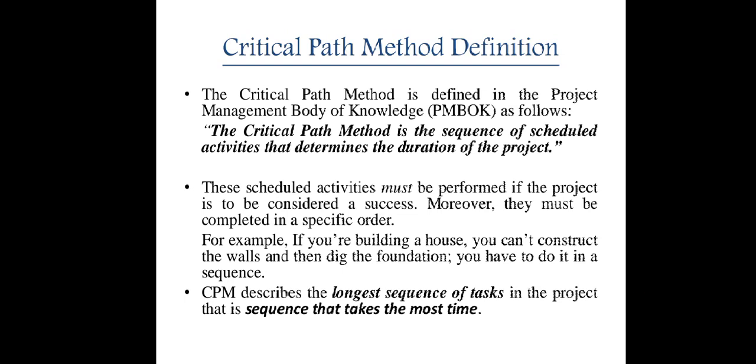See, the activities must be performed in a specific order. For example, if you are building a house, you cannot construct the walls and then dig the foundation. Obviously, first the foundation has to be dug, and on that the walls have to be constructed. So activities must be performed in a specific order. So that is the meaning of that. And CPM describes the longest sequence of tasks in the project, that is the sequence that takes the most time.